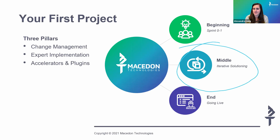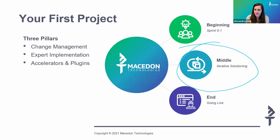The last thing is people-oriented but also a hybrid of people and process: it's the training plans. You want to give the stakeholders the support they need during this change. Once you go live, you need to identify two things: what do they currently know and what do they need to know? The gap between those two things is where you're going to target your training plans. If you have a bunch of users that are brand new to Appian, you need to give them Appian training — or whatever technology you're introducing. If you're changing a process, removing some steps, or adding a new team, you need to make sure there is training on what the new process is. No training plan is going to be identical across any project. The goal throughout the iterative solutioning phase is that you want your users to be up and running the day you go live — not weeks later — using it to maximize the value of the project on day one.